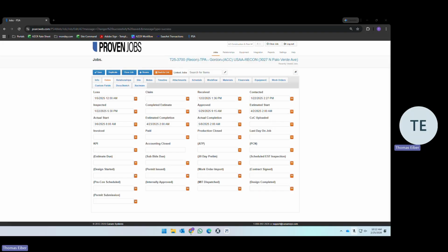With Outlook, you are putting scheduled pre-con walks and other things on the calendar for your project managers. You're also providing formal updates and formal delay notifications to clients through Outlook. We can text them if required, but an email provides a paper trail. So that's a really good way of communicating, unless they prefer text, at which point you have the ability to take a screenshot of the text and upload it into PSA if you'd like, just for record keeping.